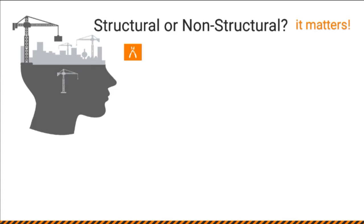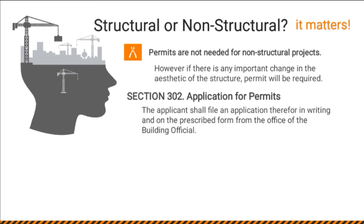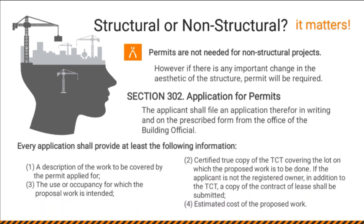Structural or non-structural? It matters. Permits are not needed for non-structural projects. However, if there is an important change in the aesthetic of the structure, a permit will be required. Section 302, Application for Permits: the applicant shall file an application in writing on the prescribed form from the office of the building official. Every application shall provide at least the following information: (1) a description of the work to be covered by the permit applied for; (2) certified true copy of the TCT covering the lot on which the proposed work is to be done — if the applicant is not the registered owner, a copy of the contract of lease shall be submitted; (3) the use of occupancy for which the proposed work is intended; and (4) estimated cost of the proposed work.